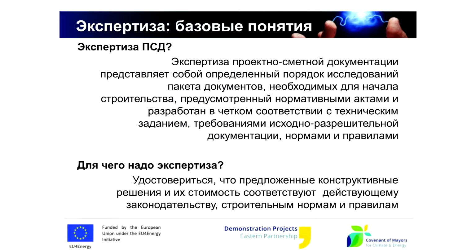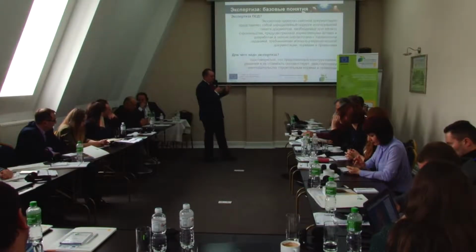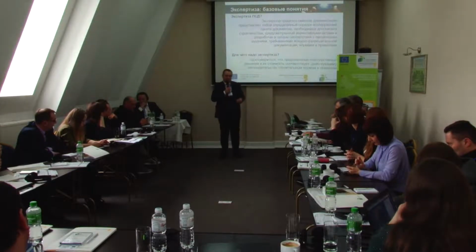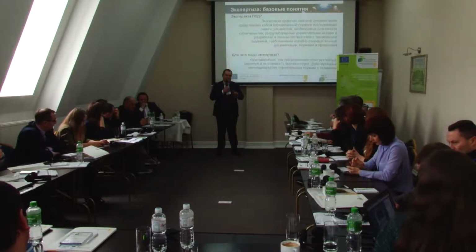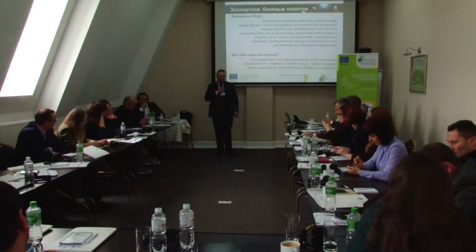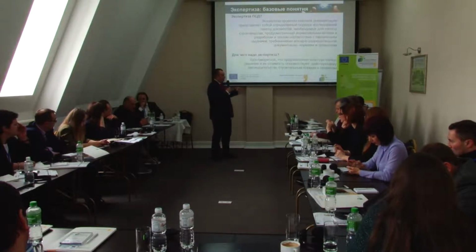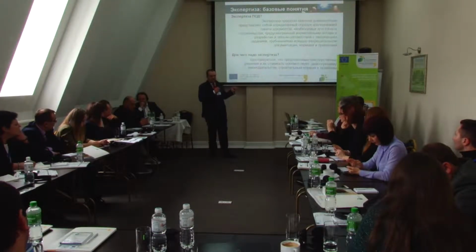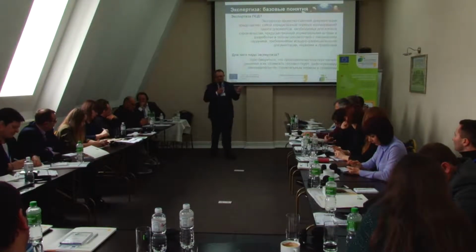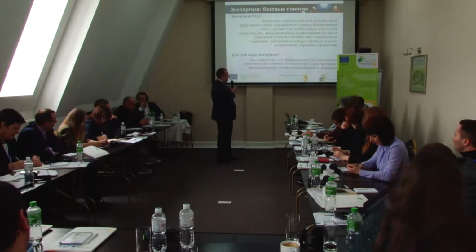The primary goal of the examination is to see that the technical solutions applied in the project meet the requirements and are real in terms of budget. So this examination or verification looks not only through the drawings and technical solutions, but also verifies the prices, the budget, and the requirements, the compliance with the national norms. As a result, after this examination, you already have the maximum price of the project, the threshold